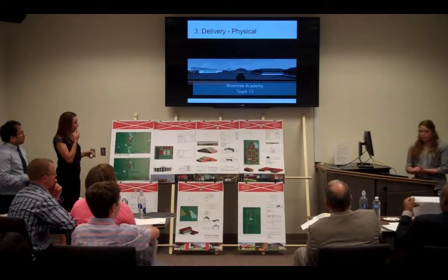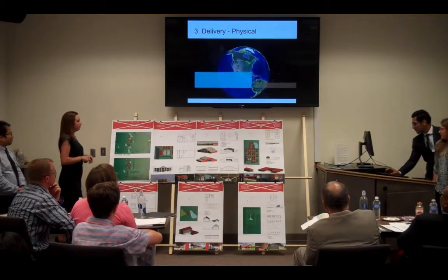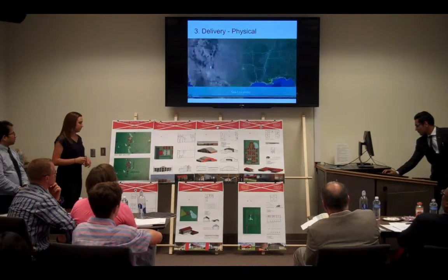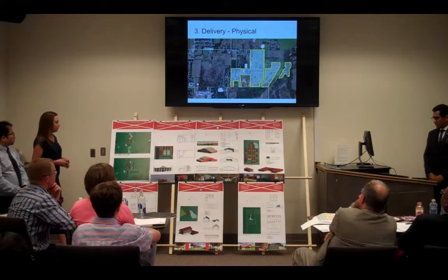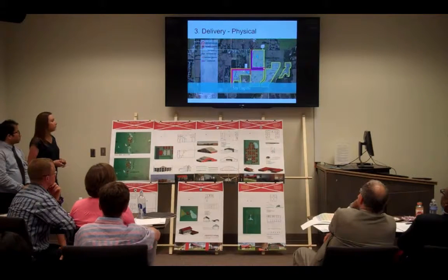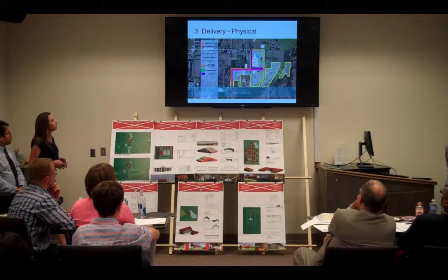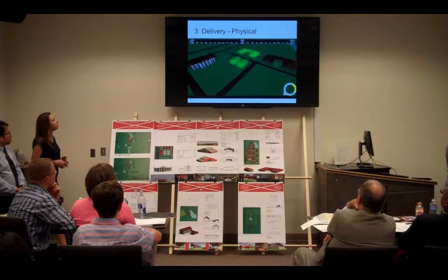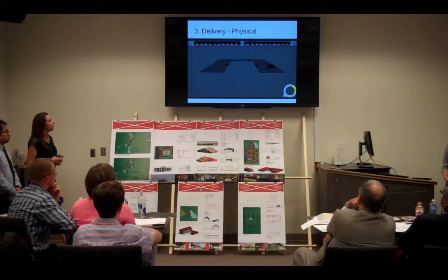Howdy, today we as members of Team 13 will be presenting the construction sequence of RIVERTREE Academy project located in Fort Worth, Texas. The project begins with layout of the site boundary, which is further followed by demarcating the construction zone along with entry and exits for the roads facilitating the construction activity on the site. The project is divided into 7 phases spanned over 10 years.